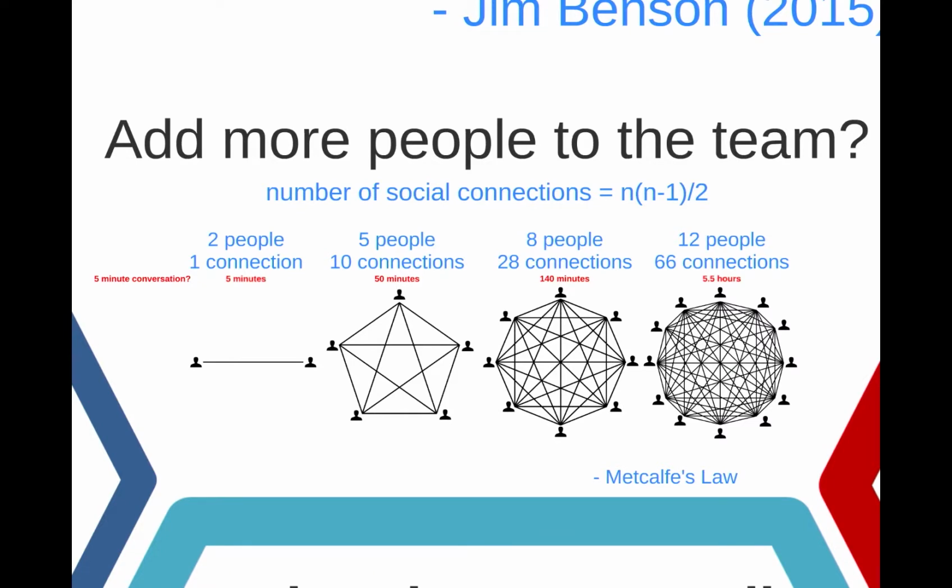And so some people go, well, if we can't take on multiple things at once, how about we just bring on more people to deliver more stuff? Now, again, let's throw people at the problem. That sounds like a good idea. Maybe we've got money and we've got people that are free, so let's throw more people at it. But unfortunately, this is really bad too, because we know from Metcalfe's law that in relation to teamwork in particular, the more people that you add to a problem, the amount of communication that's required increases exponentially.